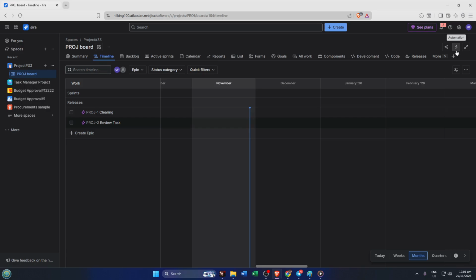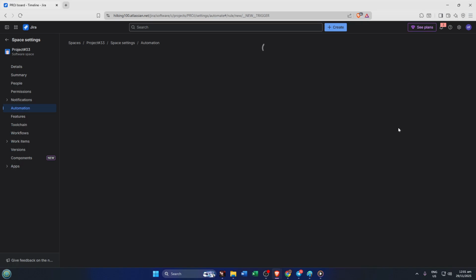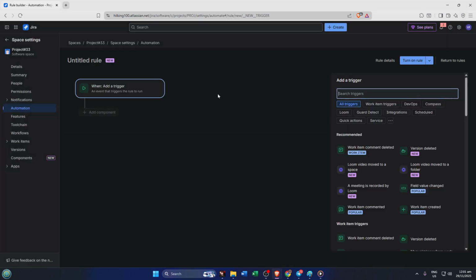To take this first step, you'll need to navigate to your project in Jira, maneuver on over to Project Settings. From there, you'll want to select Automation. You'll see it sitting pretty in that left-hand menu. Now comes the interactive part, clicking the Create Rule button. After you select this, a list of triggers will appear, kind of like a menu at a restaurant. From this menu, you'll select Issue Created, and then you just hit Save, and voila! Your trigger is all set up and ready to go.